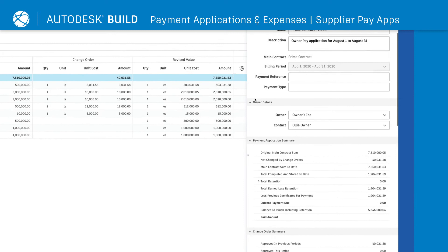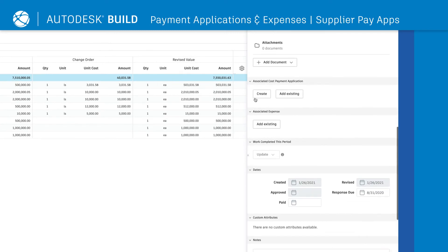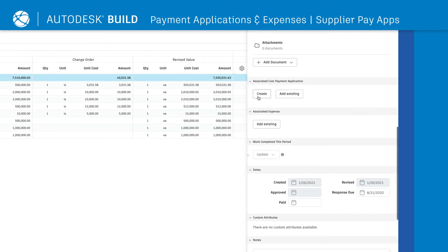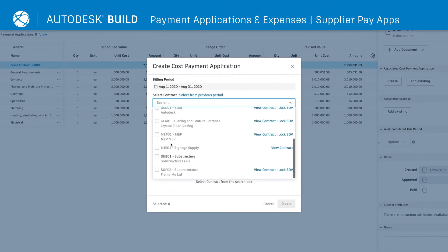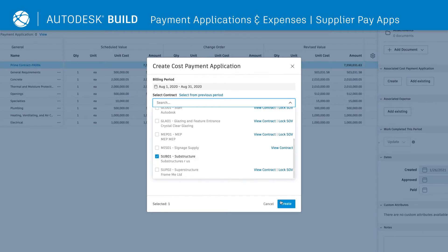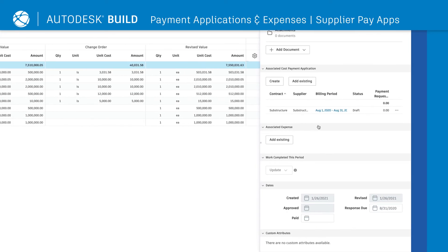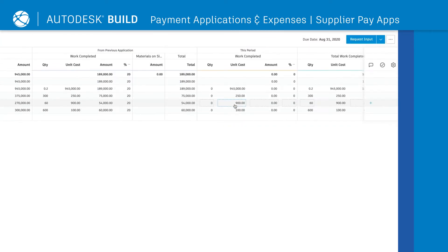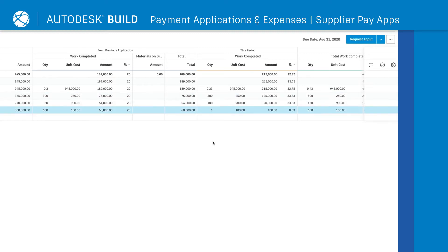Under Associated Cost Payment Applications, simply select Create and select the appropriate contract. Select the billing period for the specific supplier payment application and update the work completed for that period.